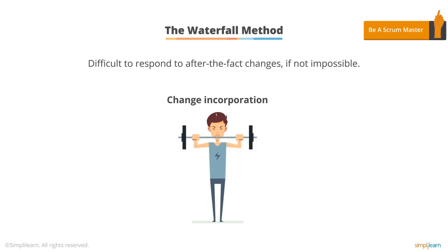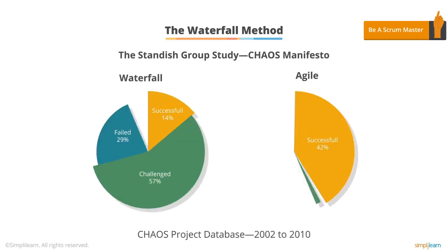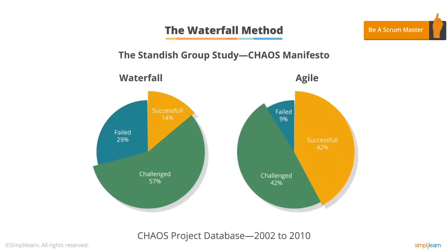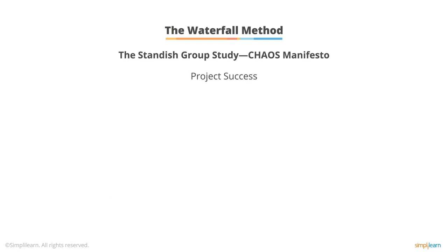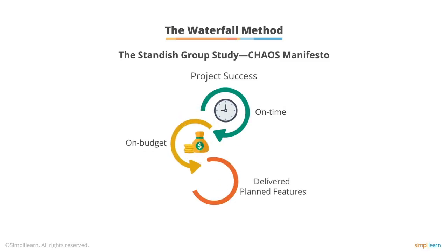In fact, the Standish Group issued a study that showed that software development projects using the Agile approach succeed three times more often than when using the waterfall approach. The Standish Group defined project success as being on time, on budget, and delivering all of the planned features.